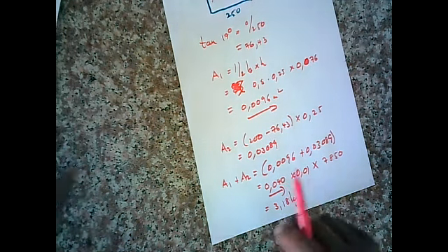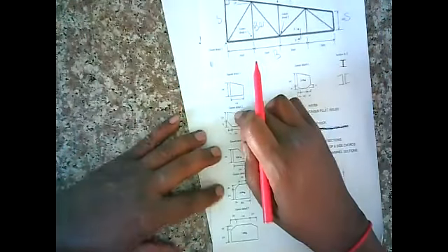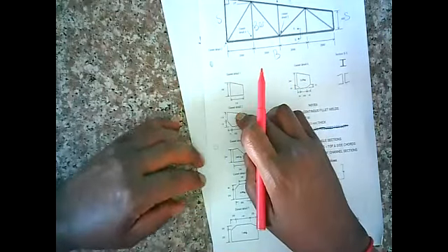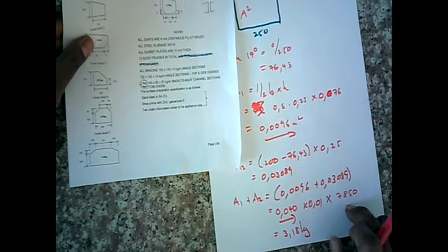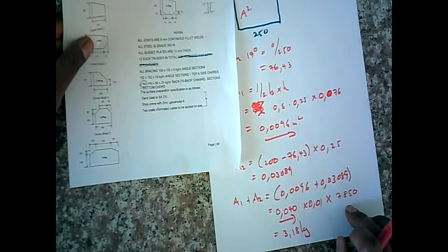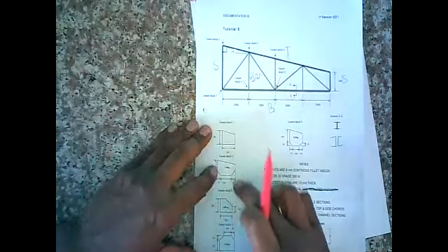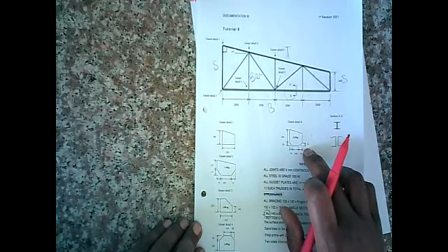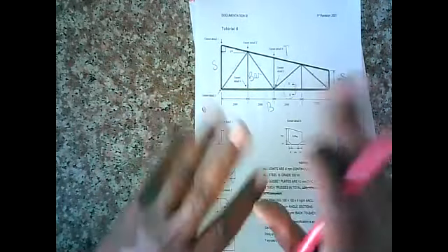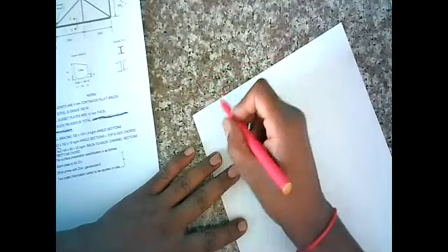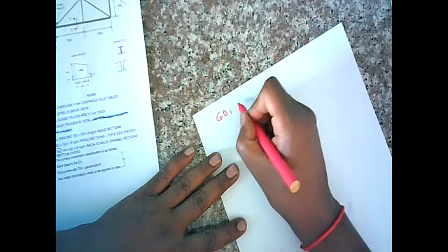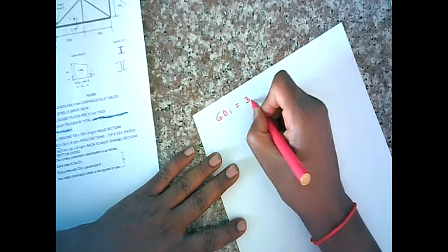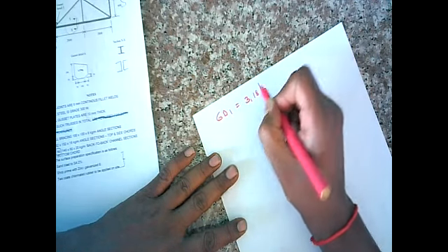All right, so when you come to these shapes here, you're gonna find area, then you're gonna multiply it by the thickness, by the constant for steel or density of steel to get each of these values here. Right. So that's basically how you quantify the gussets. Now let's put a weight to all the gussets. All right, now we found out GD1 is equal to 3.18 kgs.